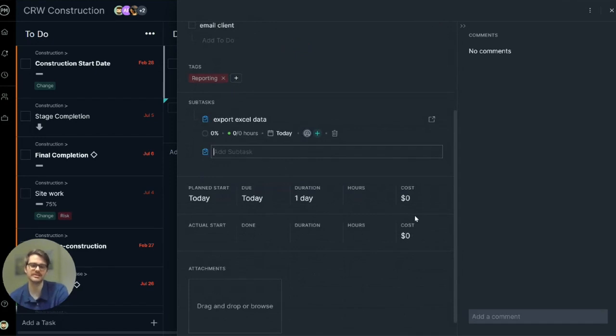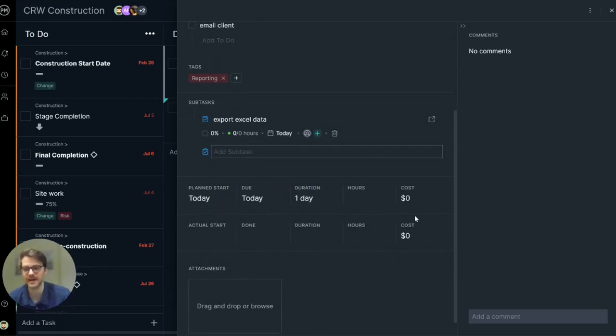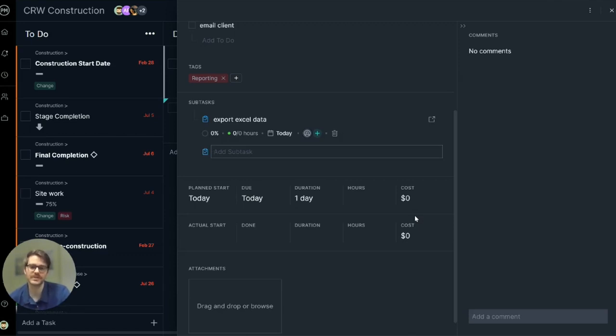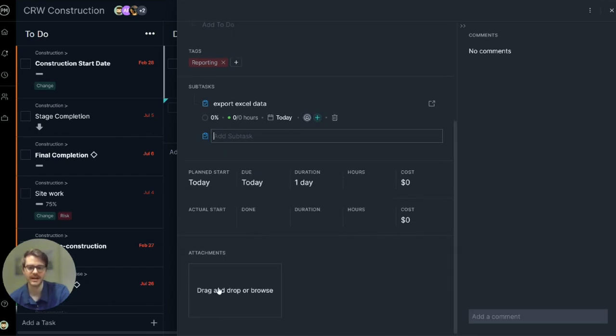Down here you can see some nitty-gritty details for resource management, cost tracking, and schedule tracking. It's got plan dates versus actuals, hours logged, and the cost of the task.